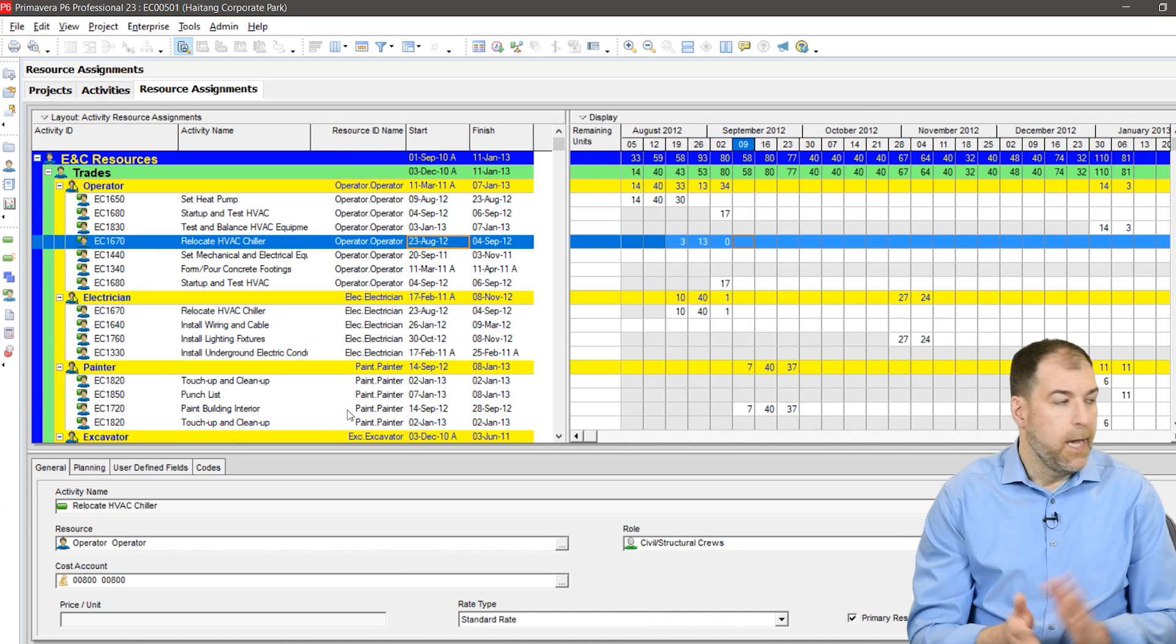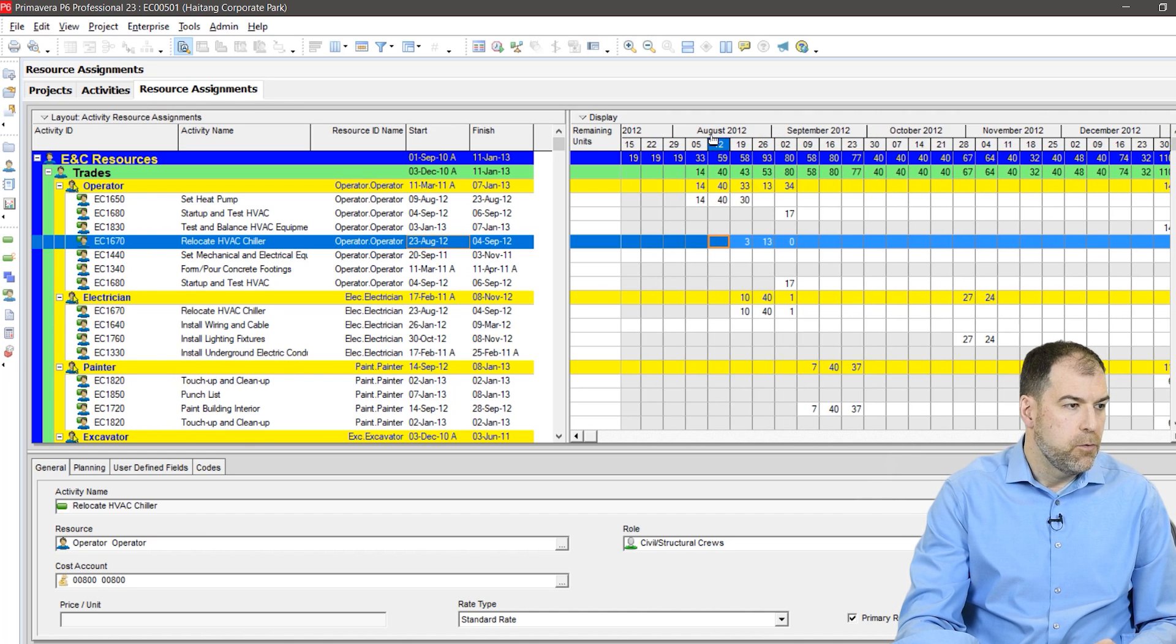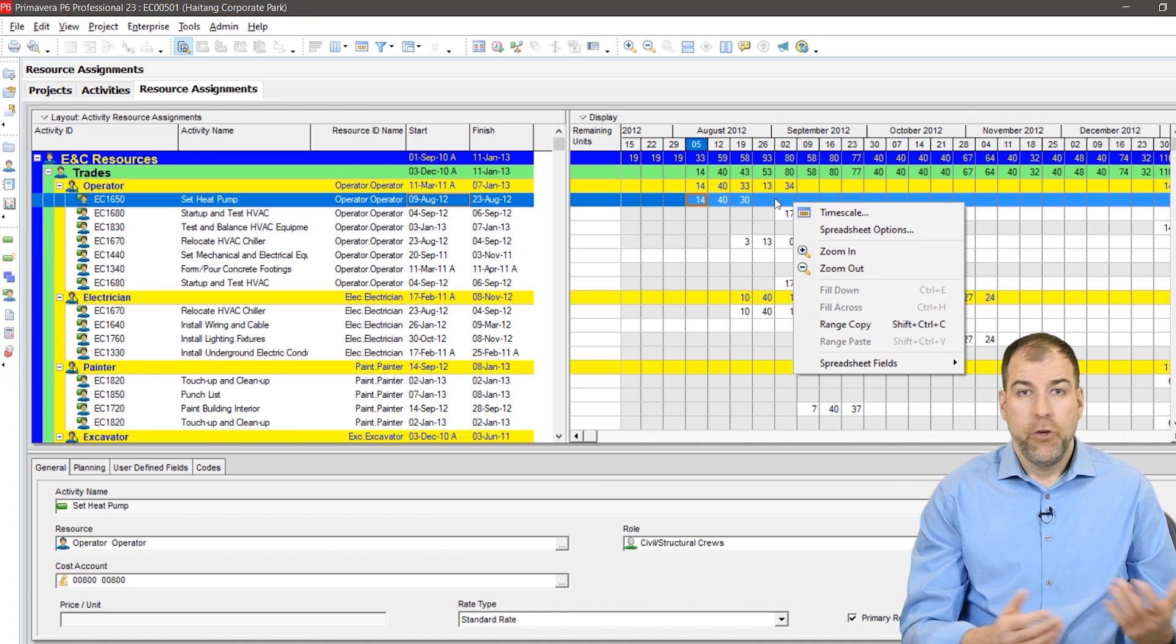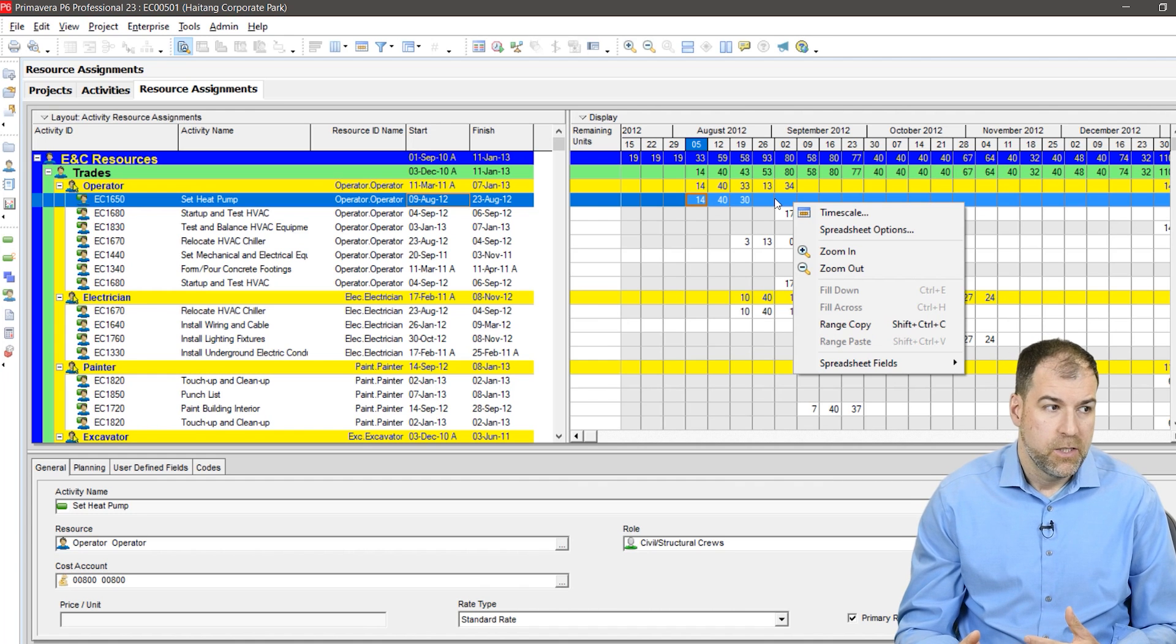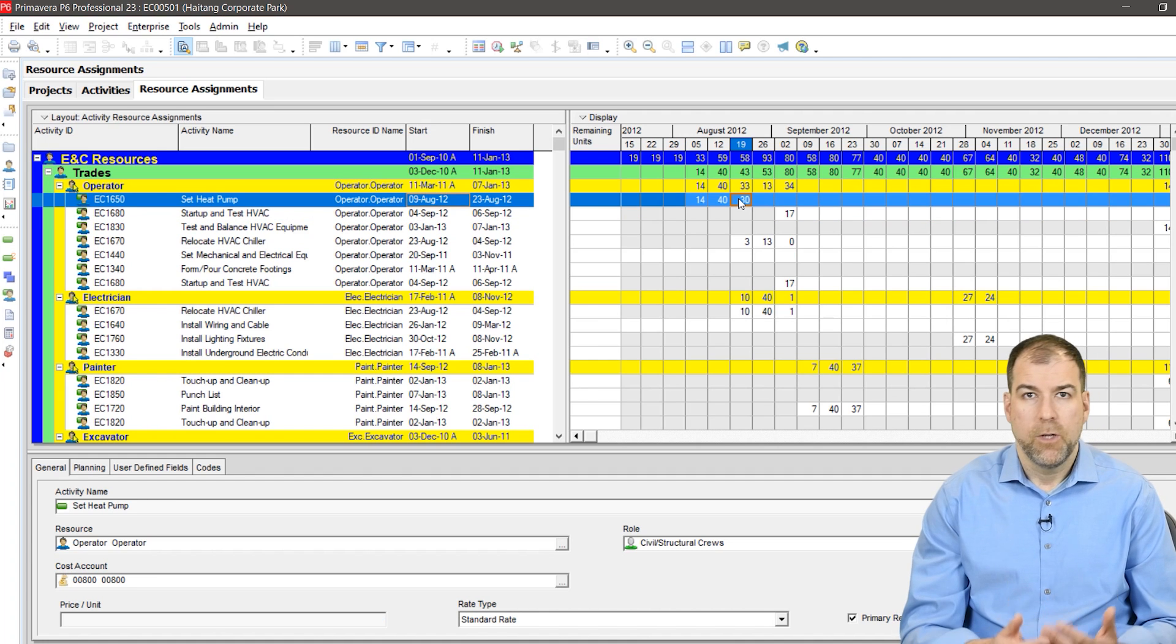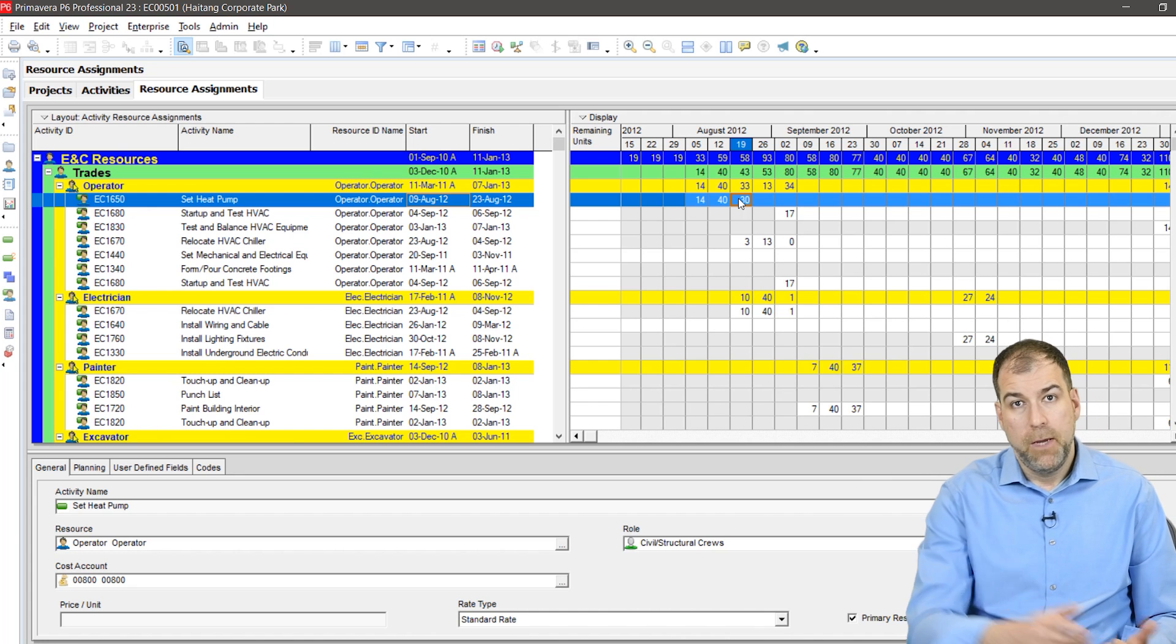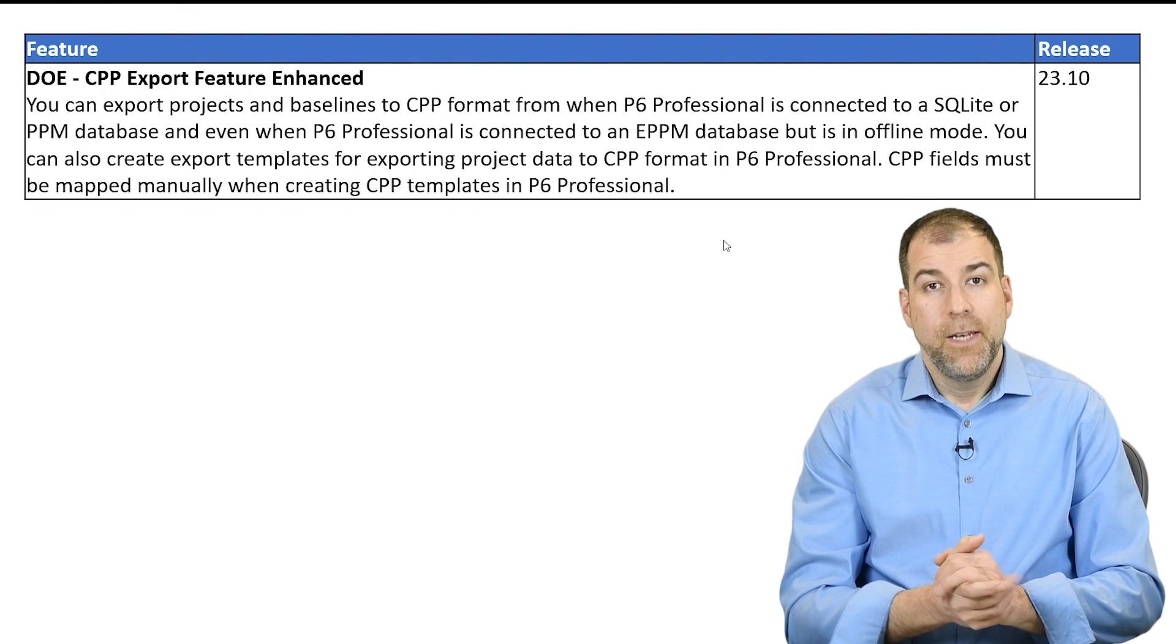Now let me show you where this is relevant. I have a project opened up here. And I'm on the resource assignment screen. And this is where we do future date planning. On the resource assignment screen on the right hand side, this is our spreadsheet. And you can actually copy data from P6 and paste it into Excel and reverse. You can use this range copy and range paste. And so that is what we're talking about. Unfortunately, we can't do that on the activity screen yet. Maybe it's coming. Keep our fingers crossed.